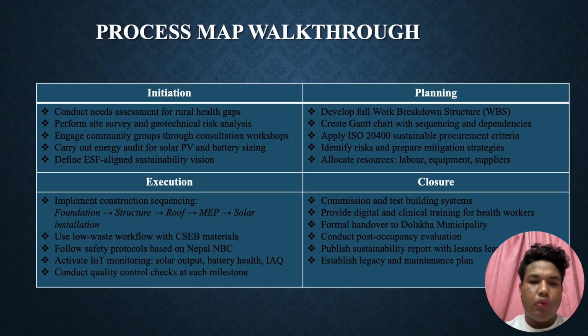Tools were installed to monitor solar performance, battery health, and indoor air quality, with quality control checks at each milestone. In the closure phase, we commission and test all systems, train health workers on digital tools, hand over the clinic to the municipality, conduct a post-occupancy evaluation, publish a sustainability report, and establish a long-term maintenance plan.